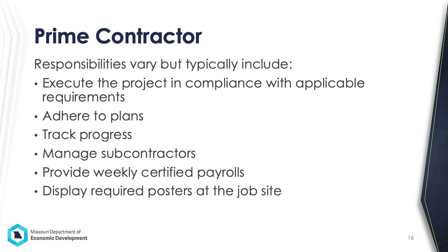Aside from the main responsibility of executing the project, the prime contractor plays a significant role in labor standards compliance. Responsibilities vary, but typically include executing the project in compliance with applicable requirements, adhering to plans, tracking progress, managing subcontractors, providing weekly certified payrolls, and displaying required posters at the job site.